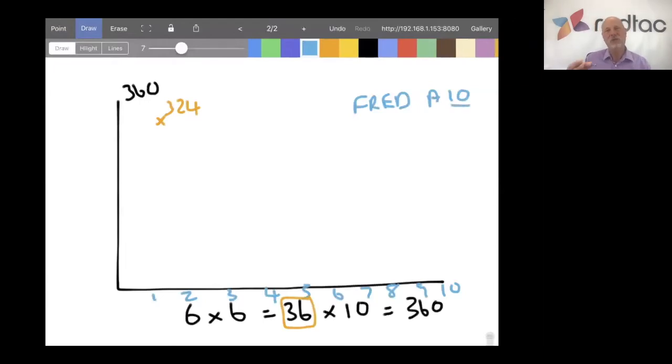By the way, some teams do this level of estimation, hour-based, and some don't. I won't go into the detail of that. If you're going to use an hour-based burn down chart, then obviously you need to have this based in hours. So Fred said it would take 10 hours. On day one, Fred starts to do task A. At the end of day one, he's going to put in the effort left, not the effort spent. He's going to put in what he thinks is the effort left. So he says, I've spent 6 hours on this, and I now reckon there's 4 hours left.